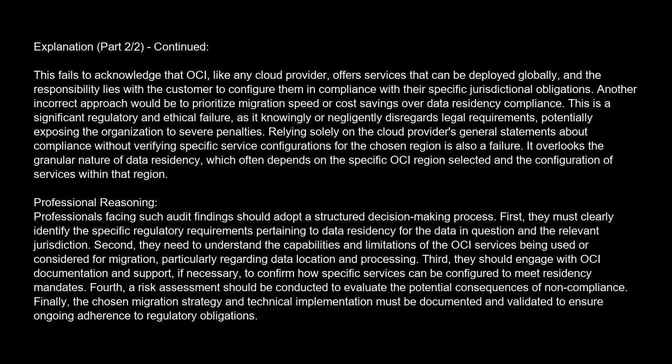Third, they should engage with OCI documentation and support, if necessary, to confirm how specific services can be configured to meet residency mandates. Fourth, a risk assessment should be conducted to evaluate the potential consequences of non-compliance. Finally, the chosen migration strategy and technical implementation must be documented and validated to ensure ongoing adherence to regulatory obligations.